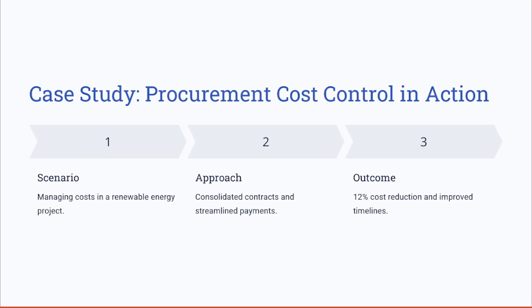project budget. You as a project manager need to follow this approach by consolidating the vendor contracts and streamlining the payment schedules, and ensure that you identify all of the root causes of the cost overruns and apply corrective actions to avoid these root causes happening in the future.